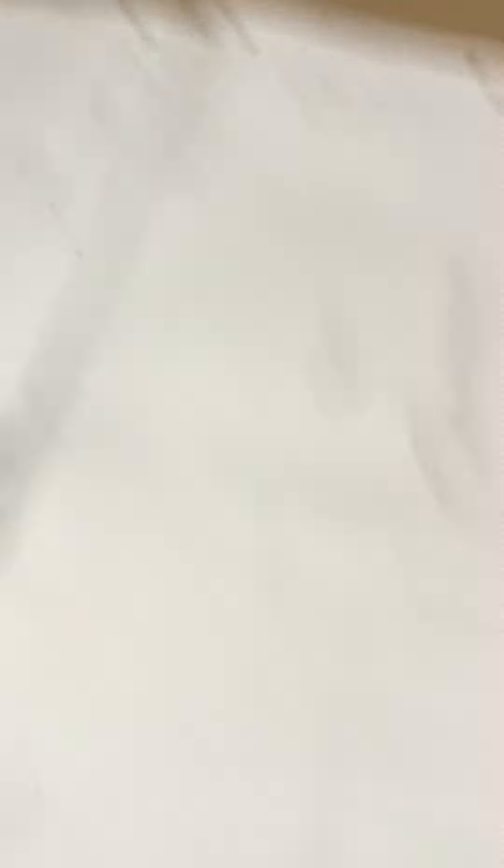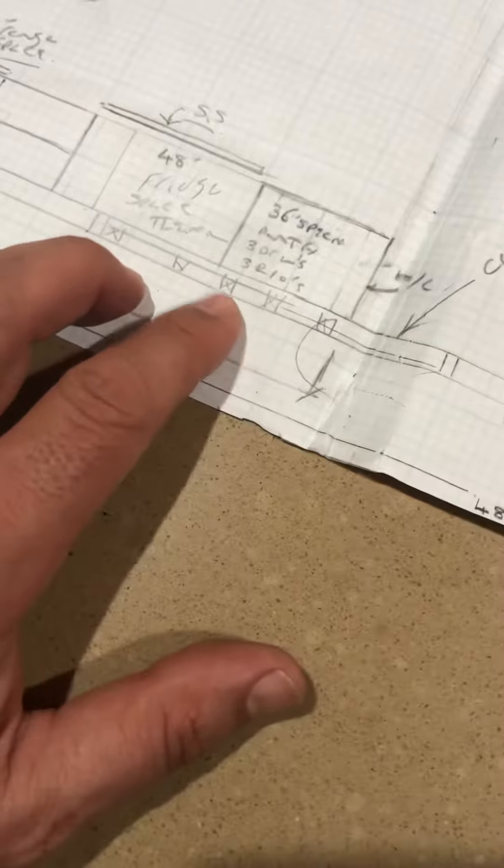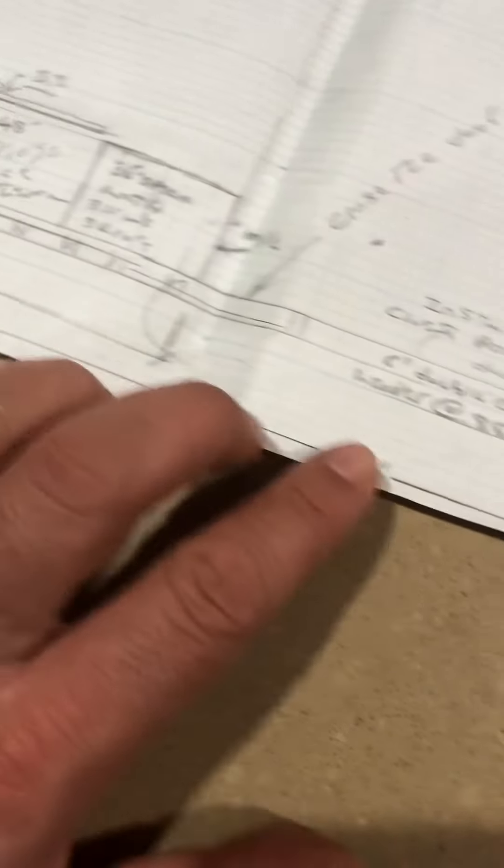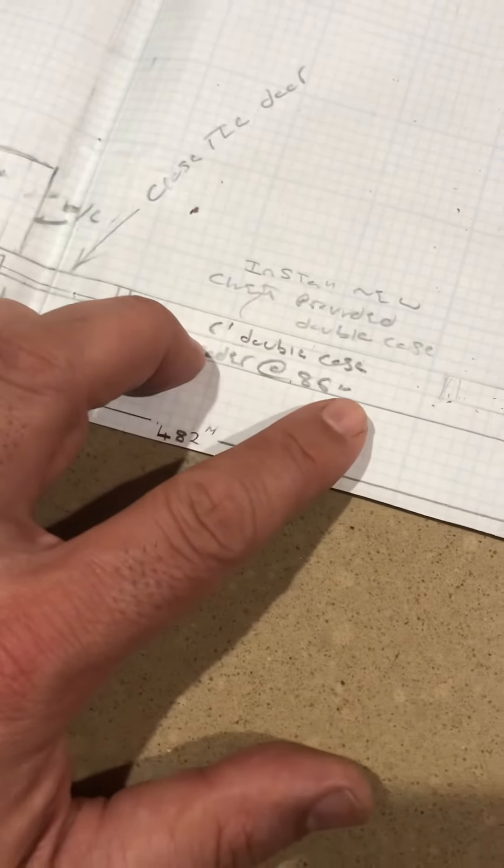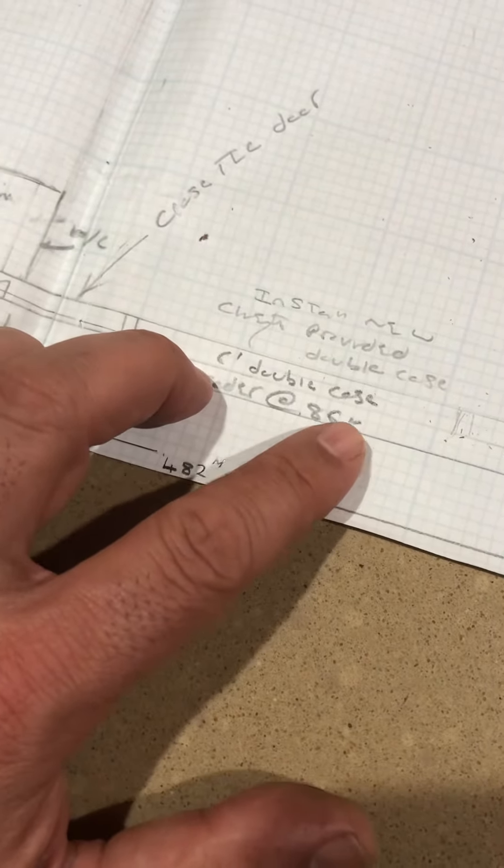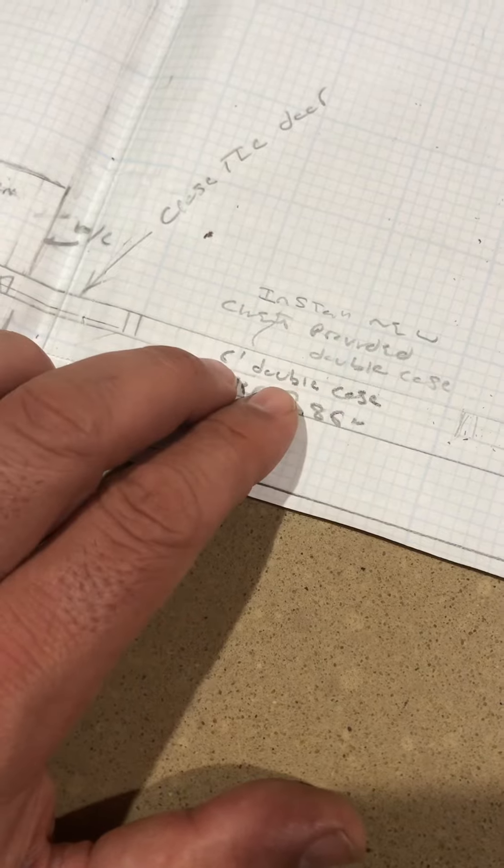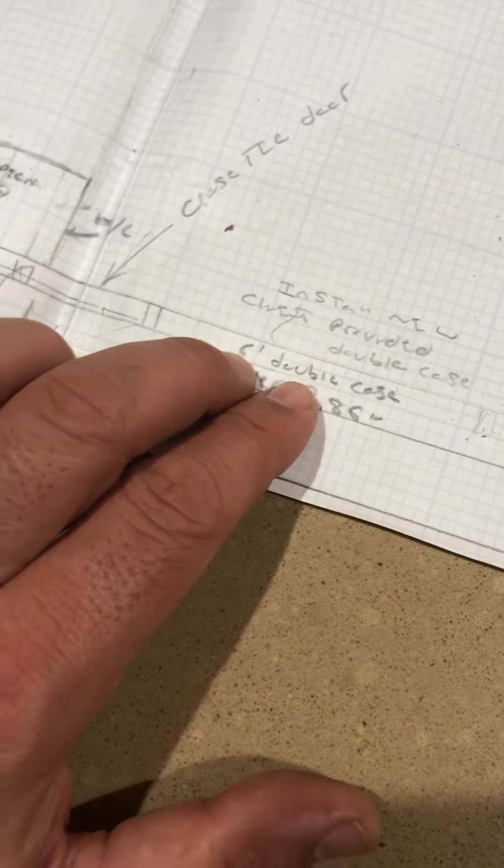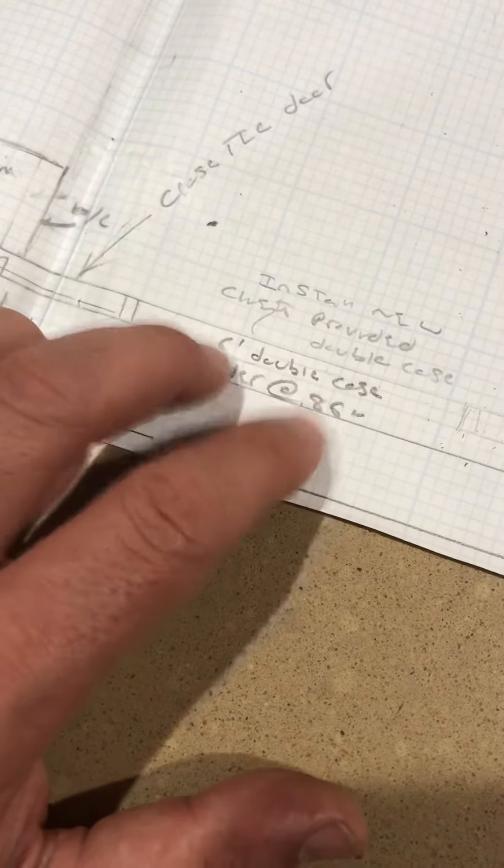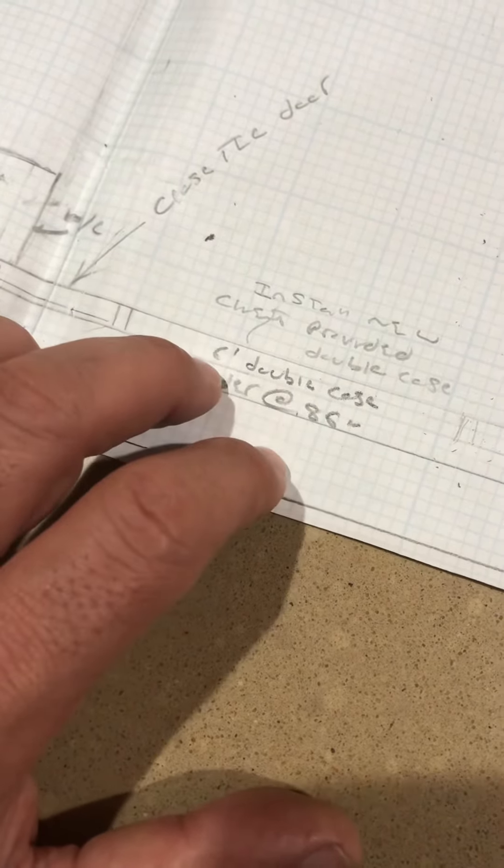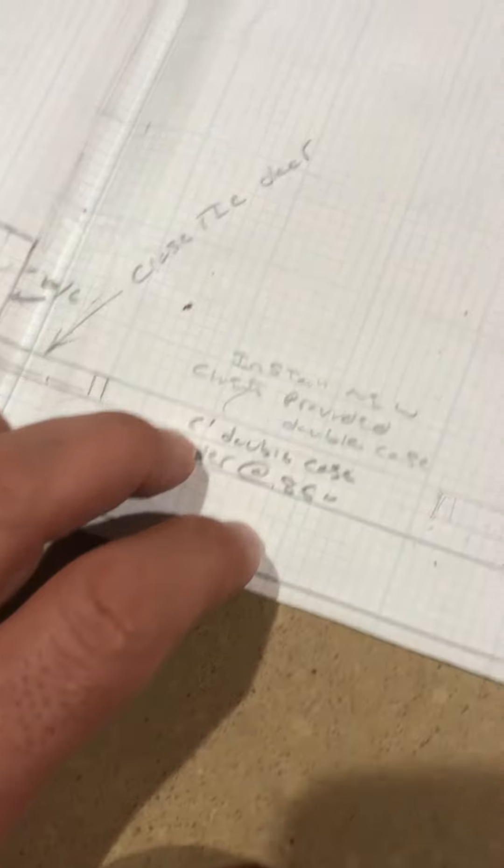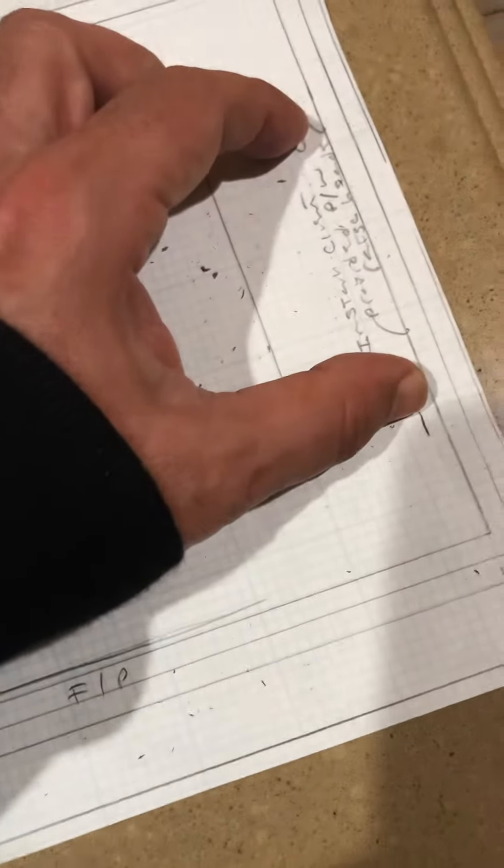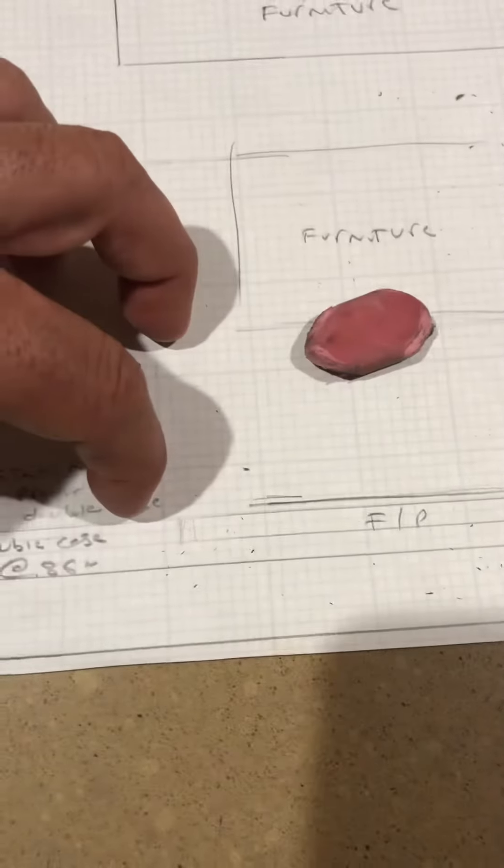So this would be a change order here, this is unincluded. We're going to close this door and then where the two windows are, take the post out, set the header at 86 inches per Gus and do a double, double, double casement.